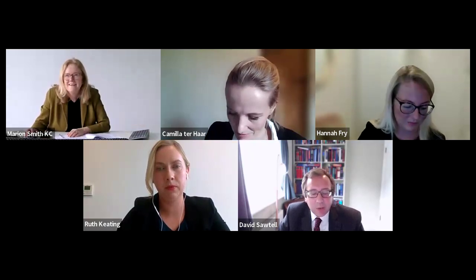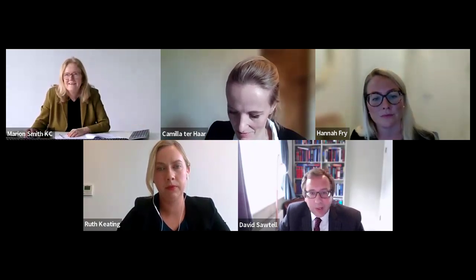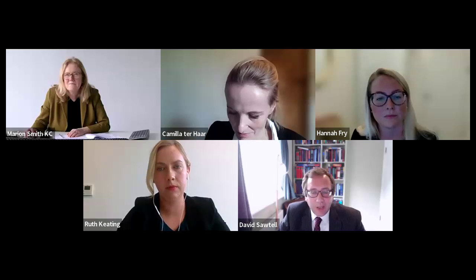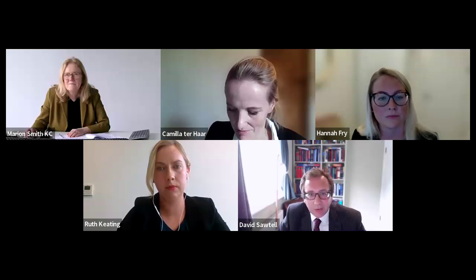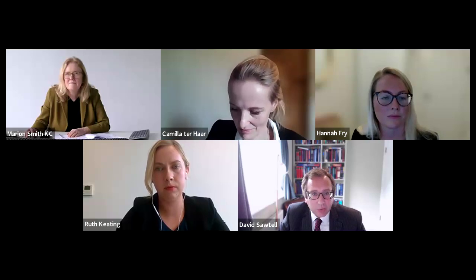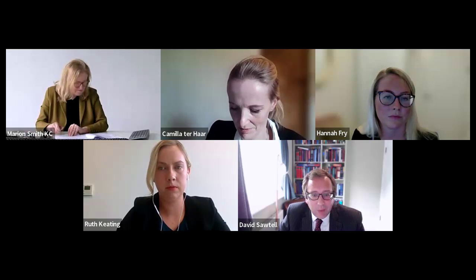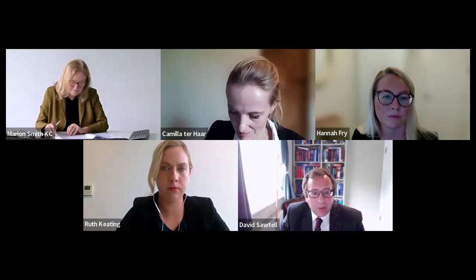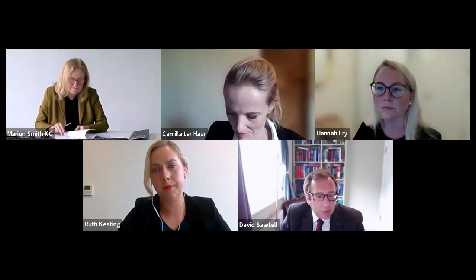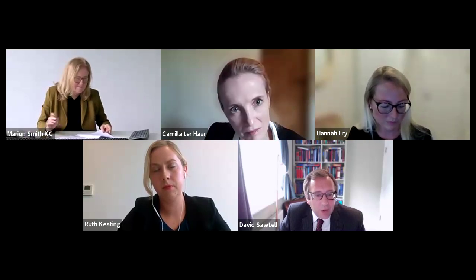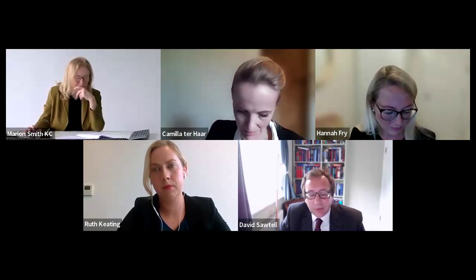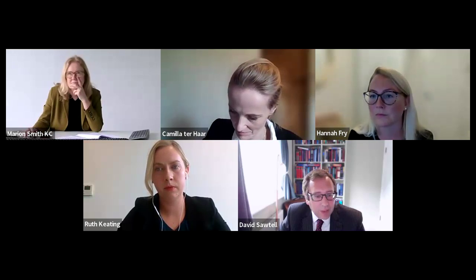Depressingly, it's still there, the word forthwith. So all of the stuff we see in the SCL Delay and Disruption Protocol 2nd edition, how contractors should not store up and save up extensions of time, it's very difficult for me to see why you can't continue to do that. The only obligation on contractors to give a notice of delay under clause 2.24 remains vague.